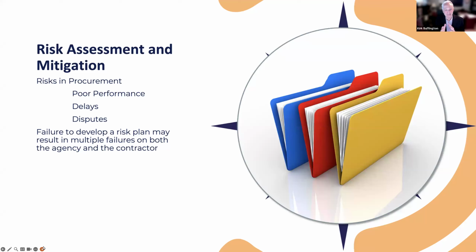Okay, so unfortunately, a surety bond agreement is actually a three-party agreement, because you have the agency, the owner, who is the obligor, you have the contractor, and then you have the surety. And we as the owner, the agency, are due the obligations of the contractor. If the contractor fails, then the surety has to step up and take care of what has not been completed on the contract.